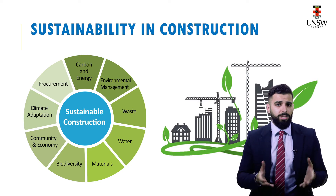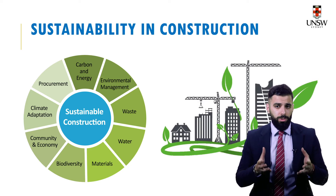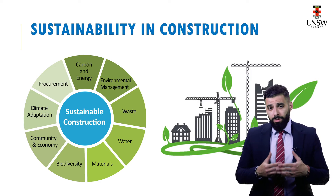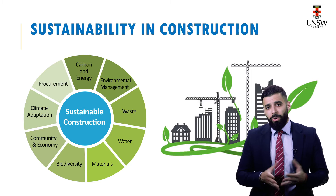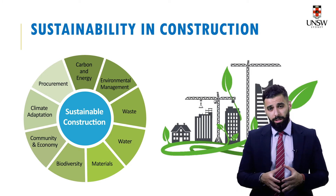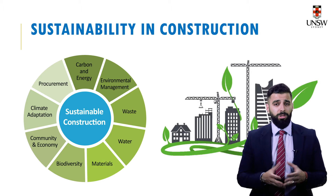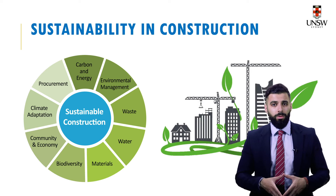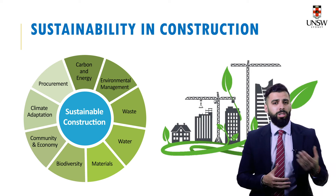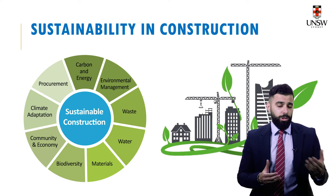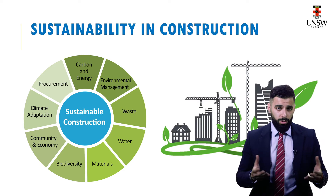What would be ways to reduce such waste? If you had better analytics on the percentage of waste that results from each activity in your construction project, you can link this to each material used via a BIM model and then use 4D BIM for simulating progress on a construction site, allowing you to plan for methods of reducing waste.